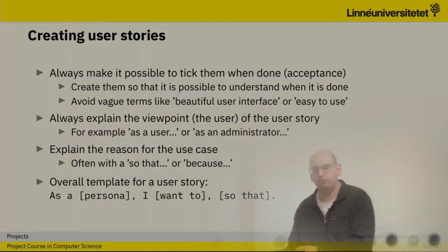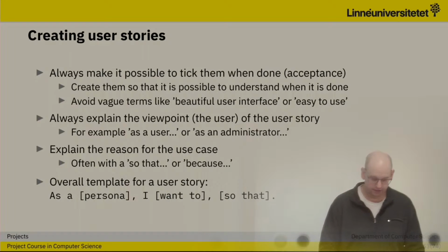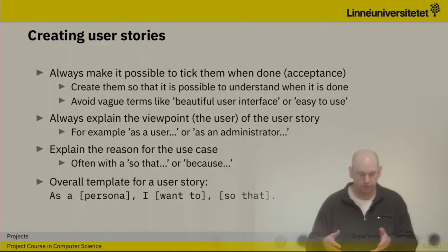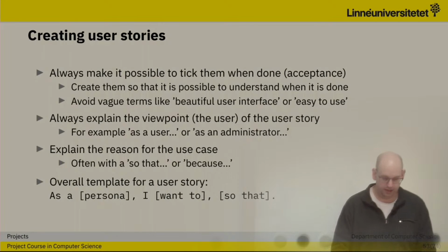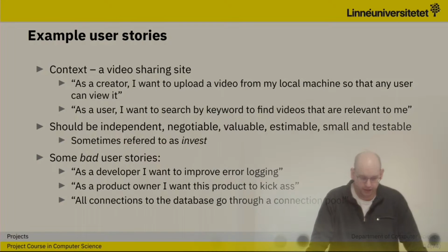Also explain the reason for doing something, so that we have a template like this: As a persona, I want to, so that. And to make it easier, here are a few examples. For a video sharing site, as a creator, I want to upload video from my local machine so that any user can view it.